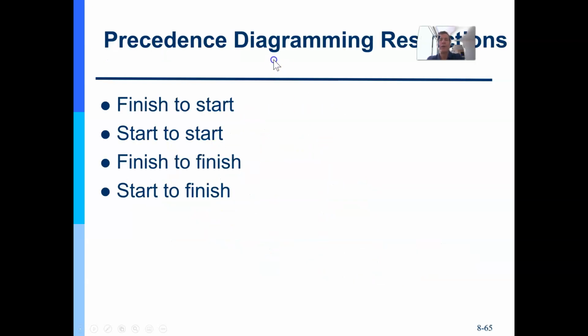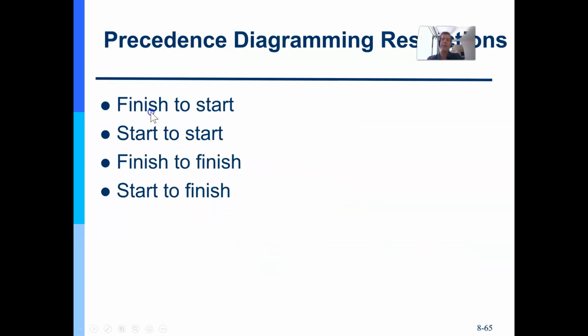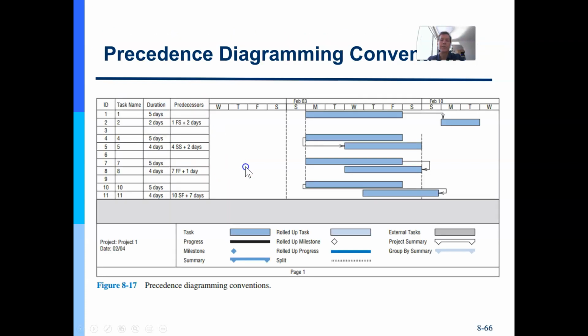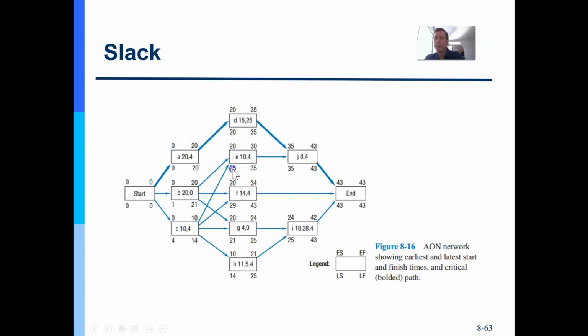Okay. So notice though that this activity has predecessor and successor activities, right? We've talked about that. Those predecessors and successors can be finish to start, start to start, finish to finish, or start to finish. If you ever sit for the PMP certification exam, you will only do mathematically finish to start. That's the most common.